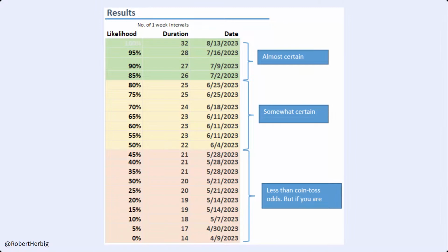Some risk-averse clients of mine prefer to use the green numbers. I usually target the 80 or 85% number. We don't want to be too pessimistic and use the 100% or 95%. But I've had some clients who were like, no, no, no. If this doesn't hit that 50% number, it's not worth doing. So let's live in that world. Let's make those assumptions. This is the conversation interaction part. Let's talk about what must be true to hit that 50% date. It's a vehicle for assumptions.